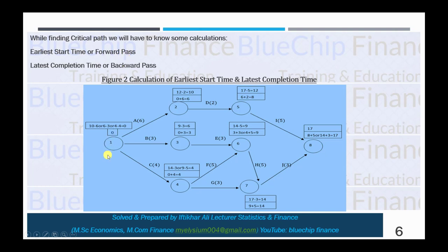When we go forward, we start from the origination point, and when we go backward, we start from the ending point. So first of all, just observe the lower rows of each calculation and ignore the upper rows, and you will focus on them when we discuss how to calculate the backward pass. Then you will have to observe the upper rows.